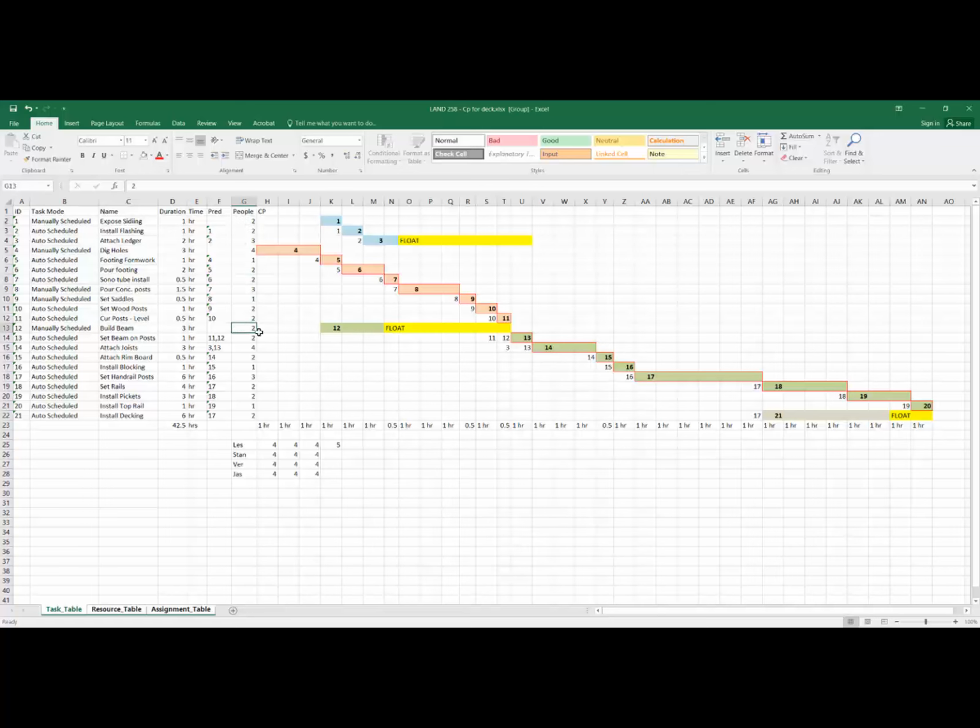That's the minimum number of people that are going to be used for that operation. So let's take a look at 6. 6 requires 2 people. So I'm going to allocate 6 here, and 6 there, 6 here, and 6 there. See, we must make sure that anything along the critical path is accounted for, and then we'll move those other individuals for the different allocations of hours.